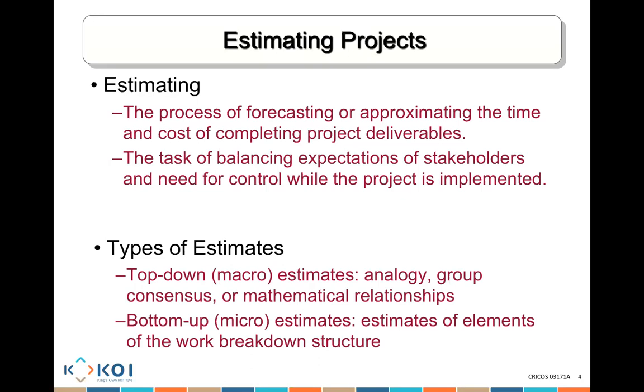So all the time we try to create an estimate of all of these costs to deliver a project and how long it's going to take. To be able to do that, we rely on what we've done in terms of the work breakdown structure a lot of the time, especially when we're creating bottom-up estimates. We need a work breakdown structure to tell me how much each task is going to cost and how long it is going to take. That's how we create the estimate if we've already created the work breakdown structure.